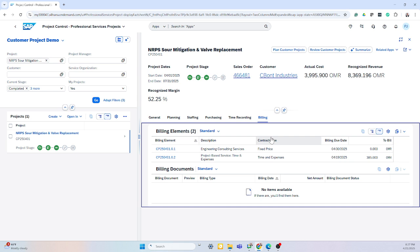As well as the billing elements. This is what would be on your statement of work. We can track fixed price, time and expenses, milestone billing, etc. And any invoices that took place would fall down here below.